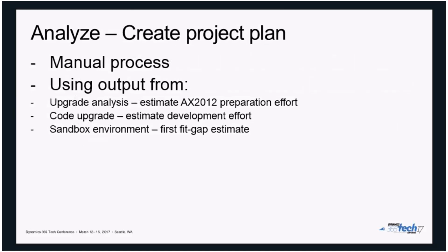As part of the analysis, you create your project plan, and you use your sandbox environment. You are going to use it for your manual process and to estimate development efforts of your code upgrade.